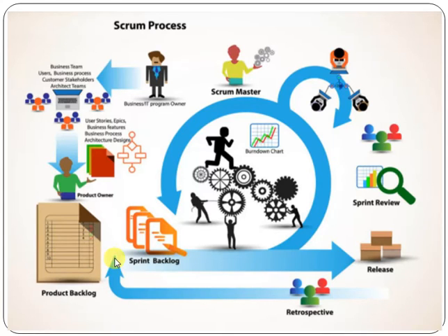Okay, once the product backlog has been developed by the product owner, then the sprint planning meeting occurs. In the sprint planning meeting, for example, if there are 40 tasks in the product backlog, the Scrum team and product owner discuss that we can take, for example, 10 tasks for a sprint, which is a 3 to 4 weeks planning, and we make another sub document that is called the sprint backlog.